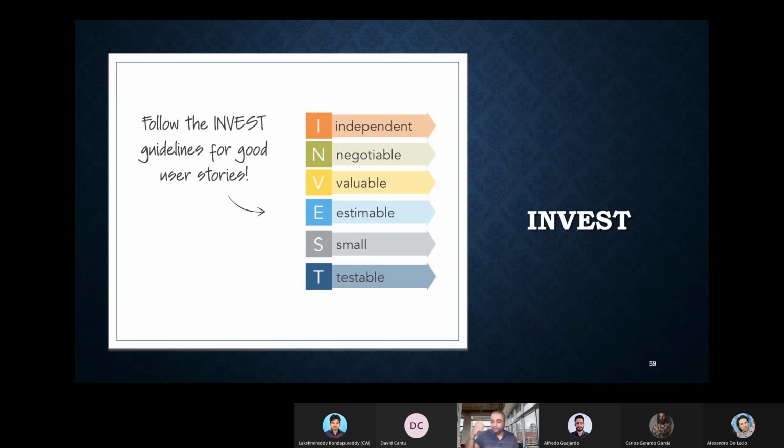Means if you remember our process of product backlog refinement, where we had 4 or 5 diamond boxes, if there is any idea which the end customer says and the product owner analyzes, and if and only if it adds value to the working software, to the vision which he had, then only we will accept, or the product owner will reject.